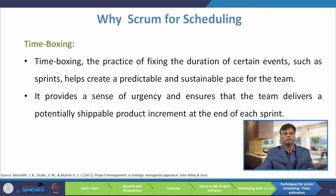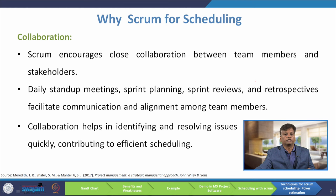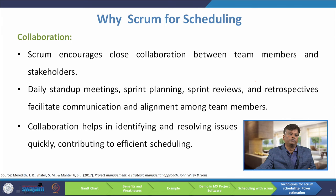The next reason is customer feedback: regular feedback from stakeholders is integrated through sprint reviews. At the end of each sprint, the team demonstrates completed work and stakeholders provide feedback. Transparency is also emphasized — the product backlog, sprint backlog, and progress are visible to all team members and stakeholders, helping identify potential issues early. Time boxing fixes the duration of events like sprints, creating a predictable and sustainable pace, and collaboration through daily stand-ups, sprint planning, and retrospectives facilitates communication and efficient scheduling.